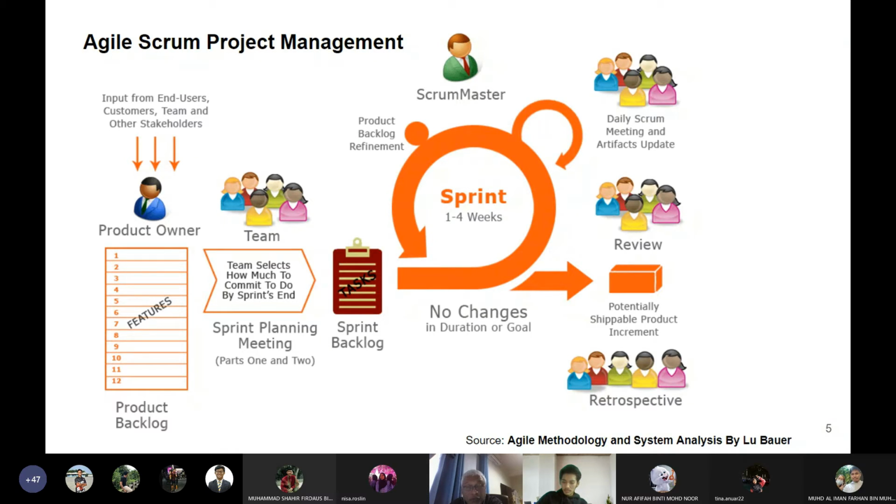You break them into which one you can do first, which one is ready. You want to do what is easiest first, or you want to do the higher risk first, or you want to do the most significant item first. So you just break them down into those categories, and those are sprints. So you may have several sprints depending on your needs.